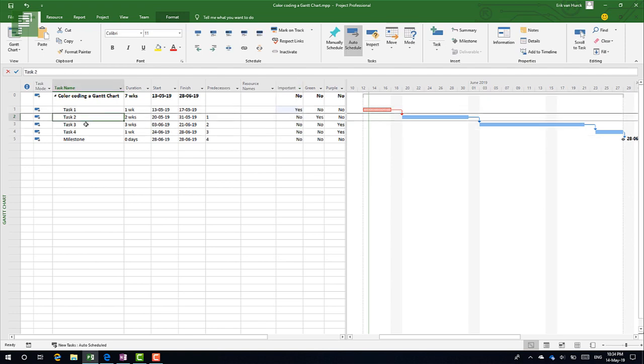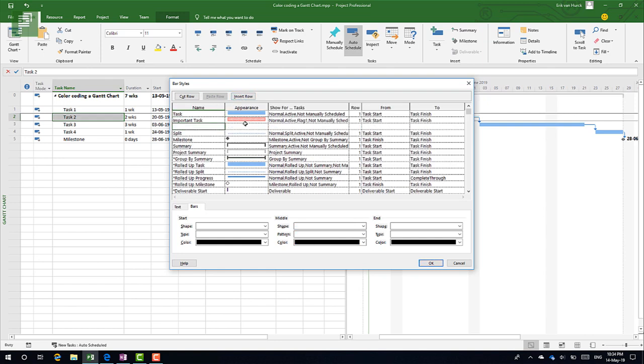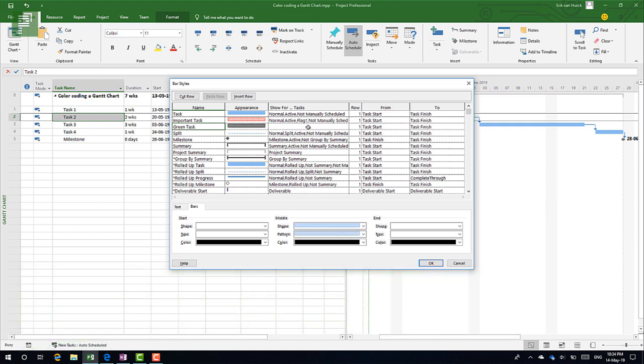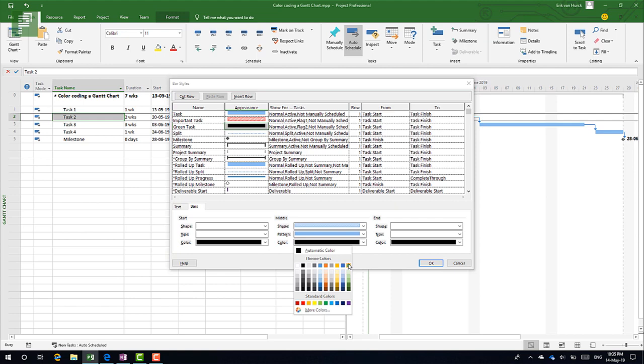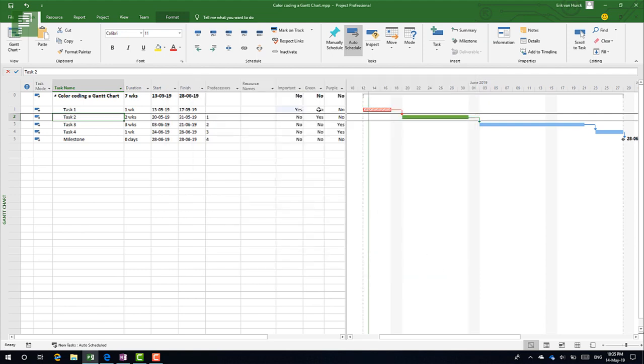So let's see that again where Task 2 is going to be green. I'm going to head on over to Task, Bar Styles, and I'm going to go below the Important task. And why below the Important task? Well, I want to first have Microsoft Project affiliate with the Important task rather than having it as a green task. So if Flag 1 is selected, it will turn up red and not green. So let's have this again, and here is Flag Number 2. I'm going to have this as a green value, and this can be full color, so I'm going to select it as being a nice little green bar here. Good.